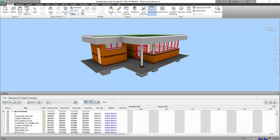Now that we're looking at a Navisworks Manage model, one of the things that we can do inside of Manage that we can't do inside of Glue is we have the ability to do a Timeliner or a 4D Schedule model. And what this does is it allows us to take our project schedule as well as our 3D model, combine them, and do a simulation to see what our project is going to look like as it's being built.